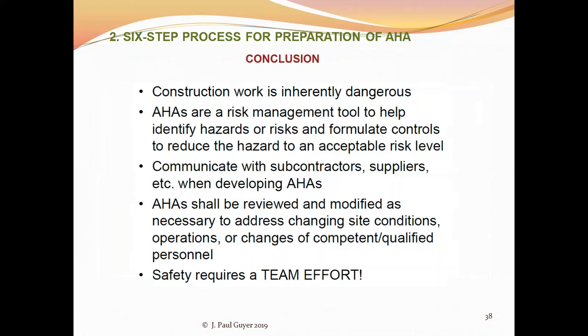So that brings us to the end of our allotted time here. Let's see, I have a question in Q&A. Page 5: work shall not begin until accepted by the owner. Is this to say the reviewed-by entry on the AHA is to contain the owner representative's signature? Yes, that's right. It's reviewed by the owner or the owner's representative. It's not prepared by, but he's looked at it.